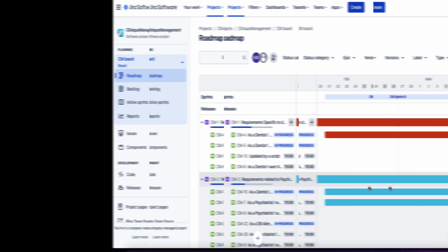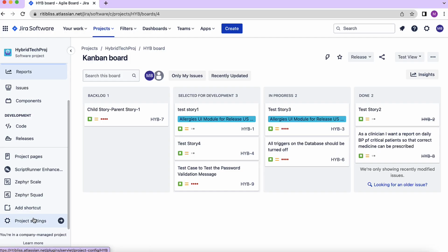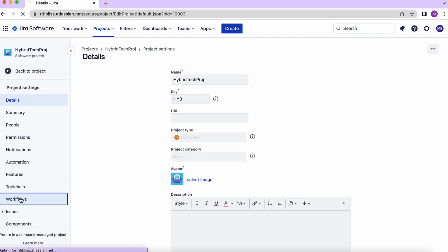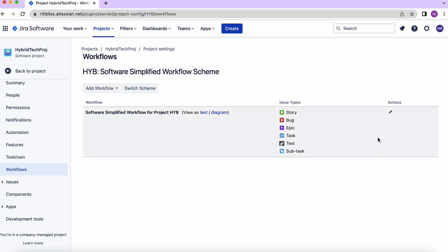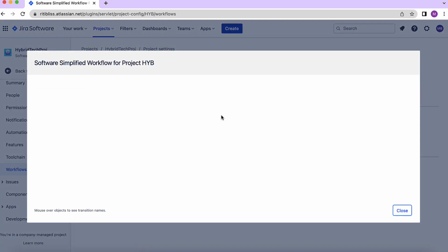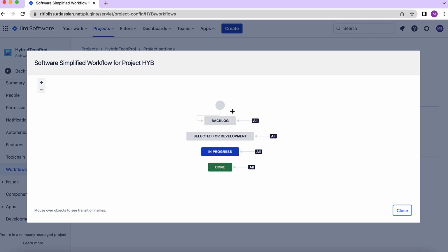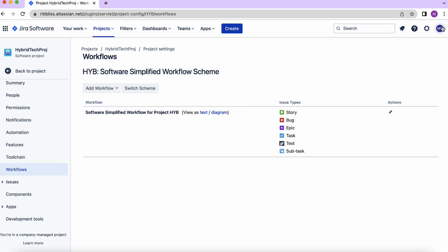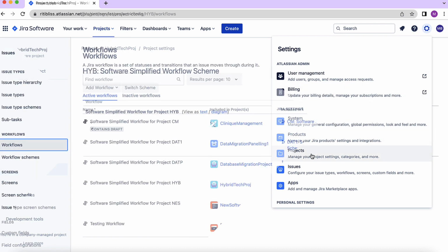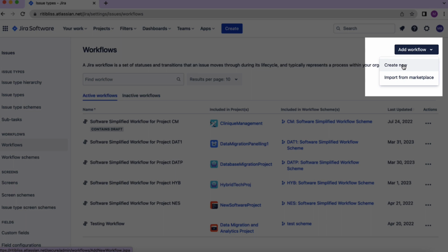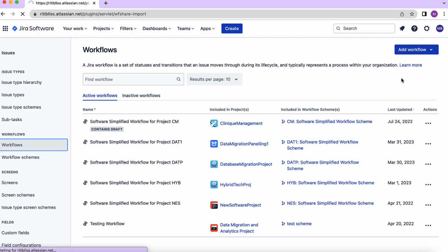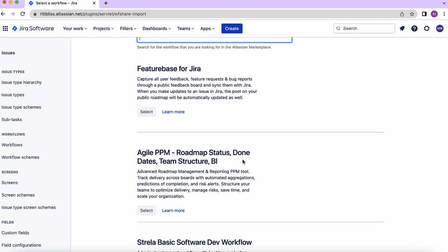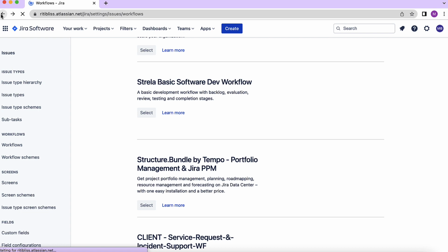Third feature which you can use is identify your process flow. While JIRA already provides a default workflow for the projects created in JIRA, since you'll be using Lean, it is quite a good possibility that you will have different states for your process workflow. That is the workflow from when your issue starts till the way it moves to production. Here, JIRA's workflow feature can help you a lot. You can create your own workflows. You can customize the workflows already provided by JIRA, and you can also use workflows that are created for other teams but in a shared mode.